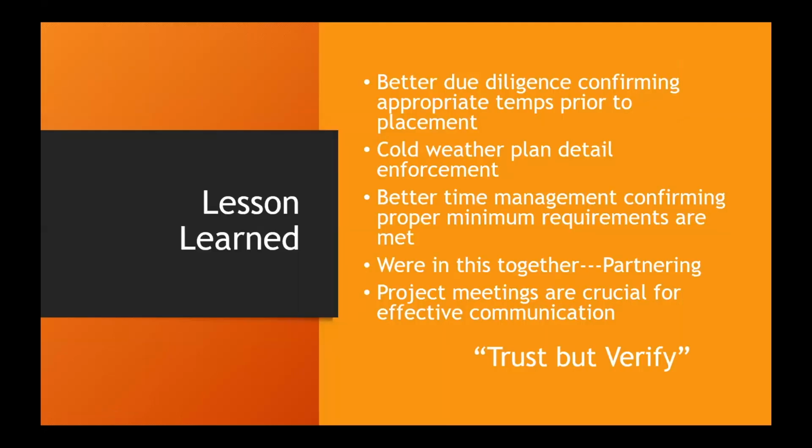So, some lessons learned by the field staff. Better due diligence, physically confirming appropriate temps prior to placement. Better time management, confirming proper minimum requirements are met. And contractor, MnDOT, inspectors, engineers, they're all in it together. We've heard about partnering, it's a big thing. Project meetings are crucial for effective communication. Trust but verify the contractor.